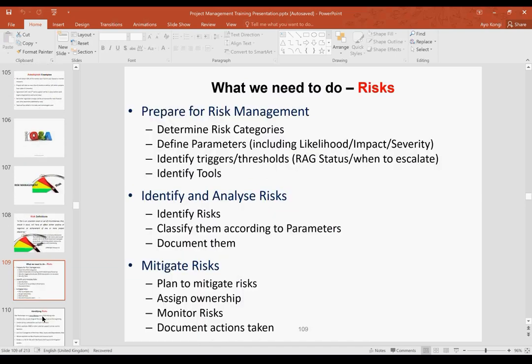risk on your project. So as a project manager, you have to be on top of it. You have to understand, okay, what is the risk response plan for this particular risk? You need to speak to your project team guys to say, okay, do we need to respond? How do we respond to this risk? Do we need to mitigate this risk? Do we need to reduce this risk? Do we need to transfer this risk? Or do we need to accept this particular risk? So there are different ways in which you can respond to risk.